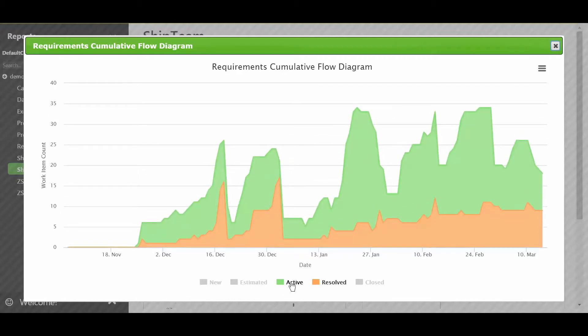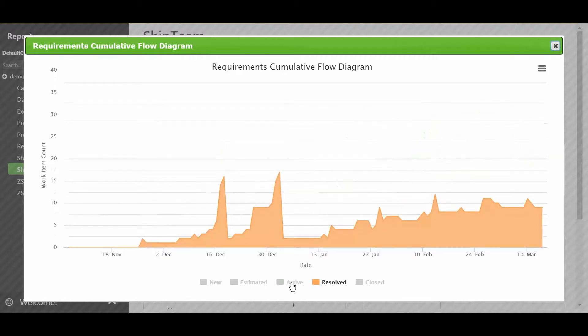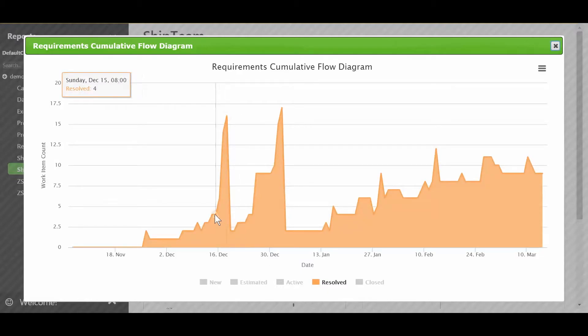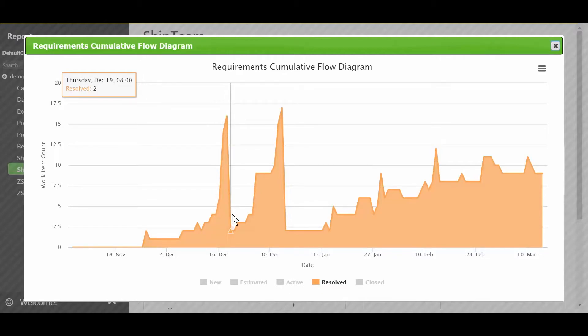Let's look at where the testers are doing their work. And in this team, it's in the resolved state. So we can see here that just in one or two days, we go from four items to be tested all the way up to 16. And then the next day it drops to two. Now this is a massive amount of spiky work that that test team is having to accomplish. That's very stressful for the test team and likely leads them to not do very good testing.